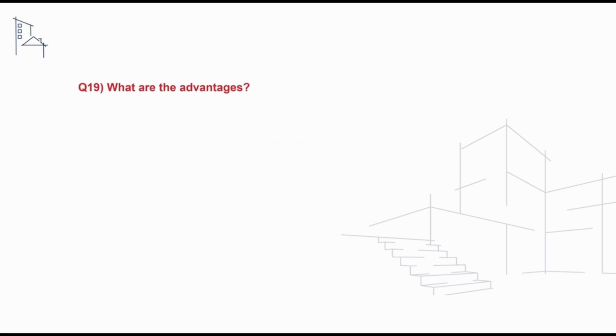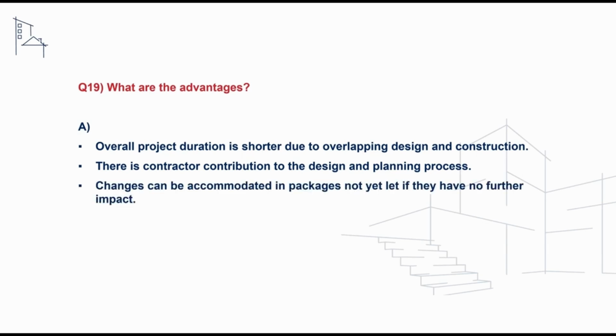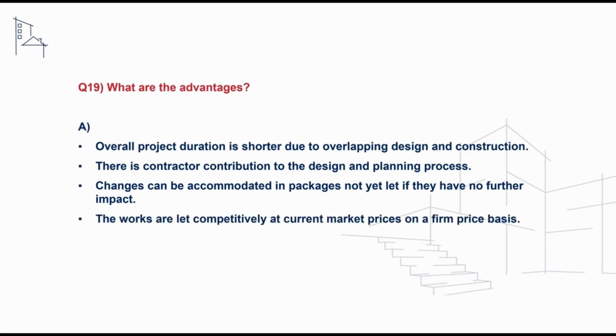A follow-on question we may receive is what are the advantages associated with management contracting procurement? And to address this, we can first of all say that the overall project duration is likely to be shorter due to overlapping design and construction phases. There is a contractor contribution to the design and planning process, meaning that the management contractor's expertise can be harnessed. Changes can be accommodated in packages not yet let, leading to improved levels of design flexibility. The works are let competitively at current market prices on a firm price basis, often resulting in increased value for